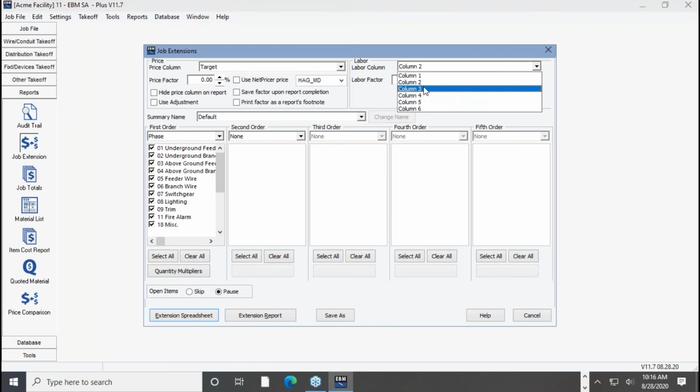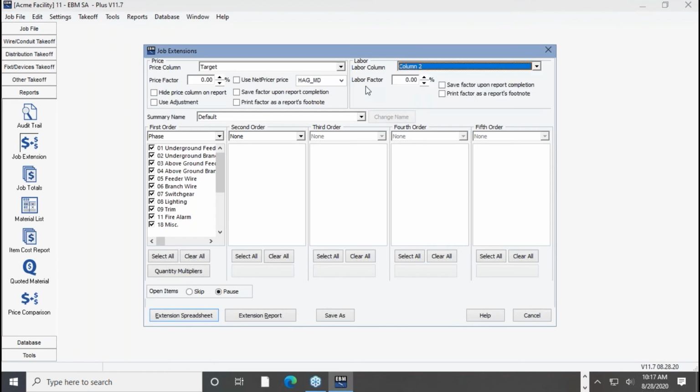Everybody understands the numbers in that labor manual are high. They're roughly double what's in column 1. So it's great for change orders, something you might want to use again on industrial work, very difficult jobs. I also think about it coming into play with a small job. You get a job with 50, 60, 70, 80 hours. The time it takes to set up, stage the job, clean up, etc., often is almost as much as the actual work itself.